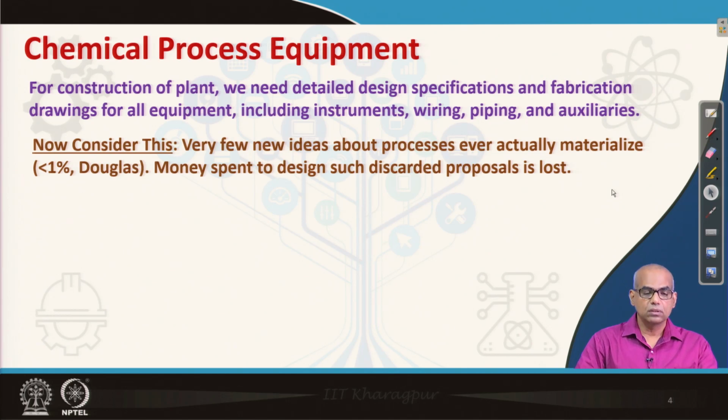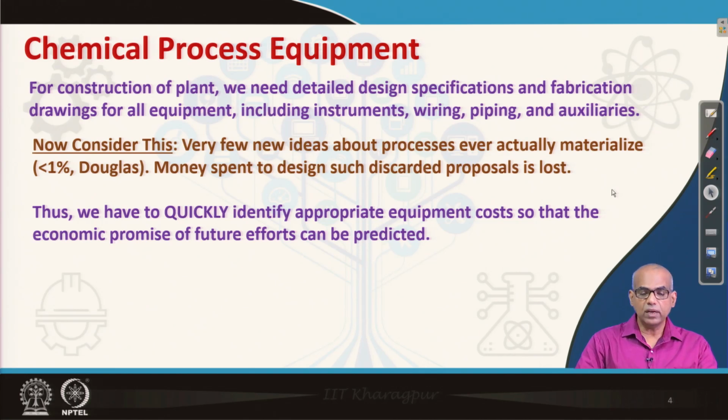Now, experience tells us that very few new ideas about processes ever actually materialize. According to James Douglas, this number is less than 1%. So, you can well imagine that money spent to design such discarded proposals is lost forever. Thus, we have to quickly identify appropriate equipment cost so that the economic promise of future efforts can be predicted. So, that will tell us whether to go ahead with the new proposal or not.